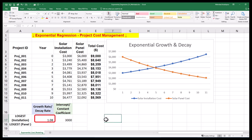1.08 is the growth rate or exponential coefficient. In this example, year after year, installation costs are increased by 8%. The intercept or constant coefficient is 3000. This shows the starting value of the dependent variable Y when the independent variable X is 0. We can use EXP function to formulate our model as installation cost equals 3000 times EXP of 8% times year.